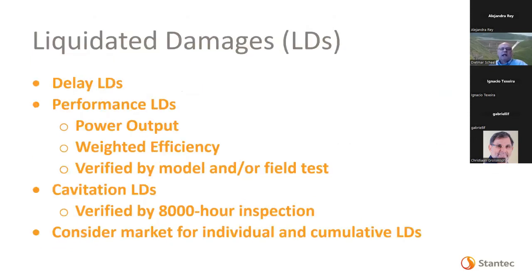That's just overall planning. A major element is liquidated damages and delay LDs, which you get out of any project. Performance liquidated damages. I think Mike Morganroth might have covered this on an earlier webinar. You'll have different performance guarantees out of the different suppliers, of course, and you'll want to make sure those are measured for, and that there's a financial penalty associated with that.